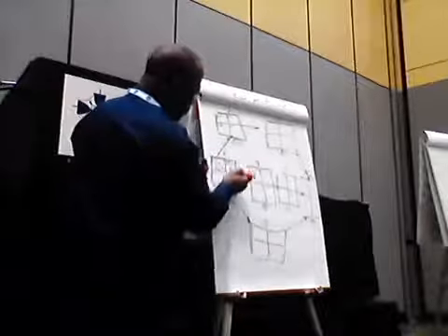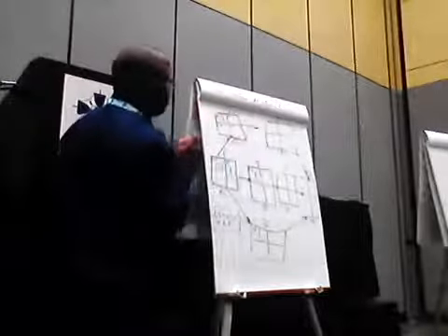So you guys should download your Project Management Essentials book. You'll find a very extensive illustration that shows you all these formulas. But for now, just think about it. Oh, this plus this gives. Now, using the forward pass, we're just going to take this early finish. This early finish is going to become the early start of everything else. So we're going to have a 1 here. We're going to have an early start of 1 here. We're going to have an early start of 1 for anything that A is a predecessor of.